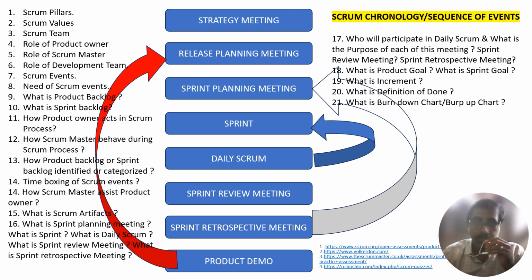Second thing, what can be done during this sprint? Through decisions with the product owner, the developers select the items from the product backlog to include in the current sprint. The Scrum team may refine these items during this process, which increases understanding and confidence.